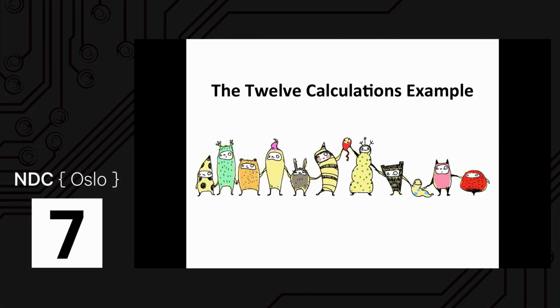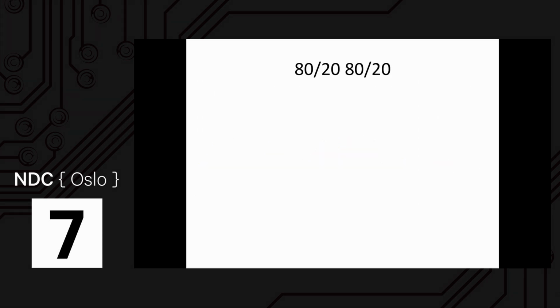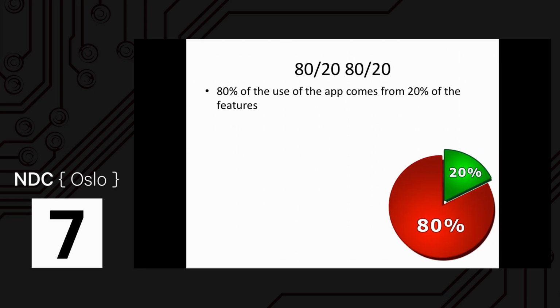I'm not going to give this example because we've run out of time, but in this example, what I talk about is how we discovered that there were some things that were more obviously important to the customer than others. Let's start on those. And if 20% of the features give us most of what we want, the 80% of what we want, let's go for those. We can't find those automatically. We have to do some work of actually delivering and seeing if it's delivering value.